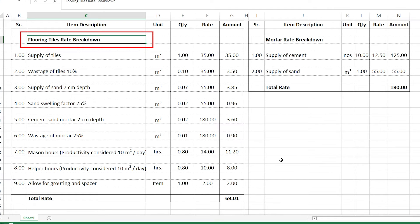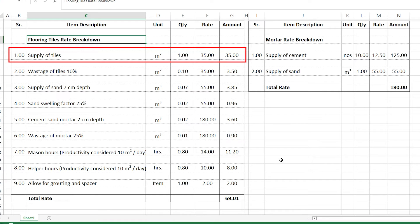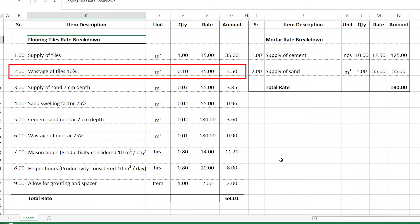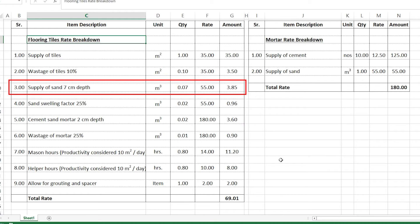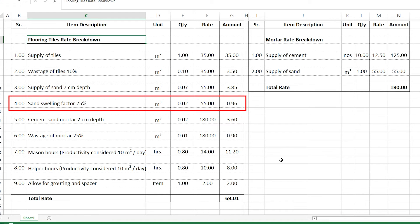Now let's look at how rate breakdown analysis works. Here on the screen we have a flooring tiles rate breakdown analysis, calculating the rate of one square meter of tile. First, the supply of tiles: 1 square meter multiplied by 35 dirhams equals 35. Then 10% wastage: 0.1 square meter multiplied by 35 equals 3.5. Then supply of 7 centimeters of sand: 0.07 cubic meters multiplied by 55 dirhams equals 3.85. With a 25% swelling factor: 0.02 cubic meters multiplied by 55 equals 0.96.